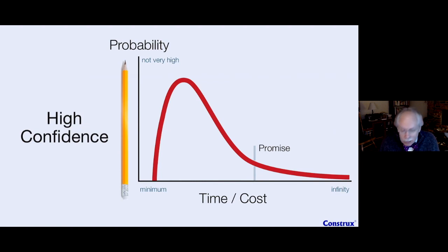Right? You might land there. Because if you pick this point, you still may have 65% or something like that. You may hit that, right? But if you really wanted to promise, if you want something you could guarantee, that's probably not it. You need to go higher. You need to find a better multiplier because you really want to get inside 90% confidence.